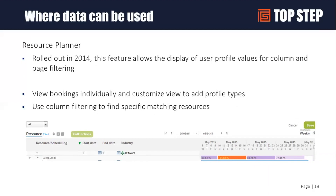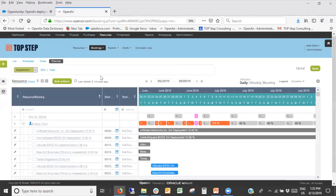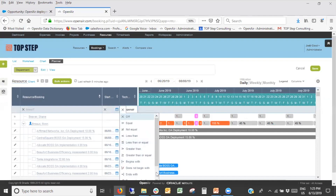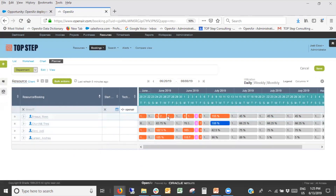The skill database can also be used as part of your scheduling function. The resource planner can actually display your skill database — one of the columns you can add is 'Profile-' and then whatever the category is. From there, you can filter and look for people with a certain skill and understand how busy they are. For example, in the planner, I've added Technology as a column. If I filter by 'contains Open Air,' it gives me everyone who has OpenAir in their skill database — and I can see these four people are very busy the rest of June but starting to become available in July.